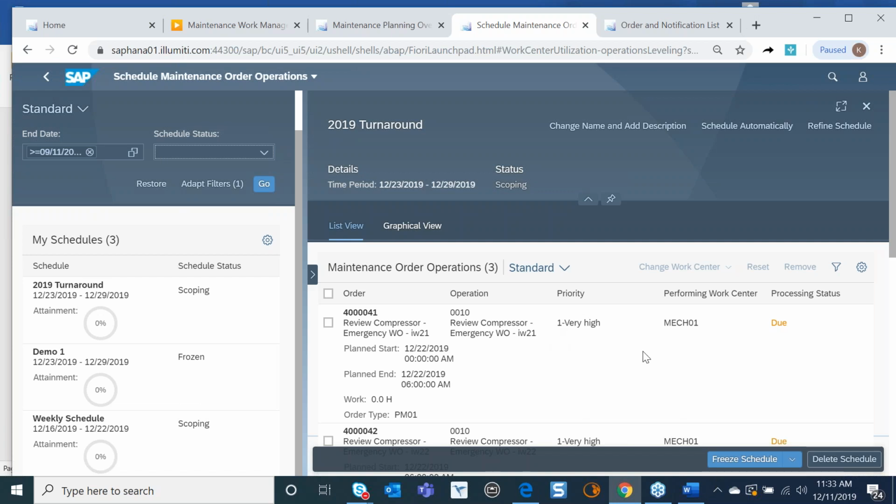That job needs to be done first. Maybe there's a confined space permit. Maybe, when we're dealing with process safety management, PSM, there are a lot of regulatory things that need to happen before we start work. We can have those on here between maintenance and operations and see where those relationships are to make sure that everything is complete. So those are the different ways that we can look at that.